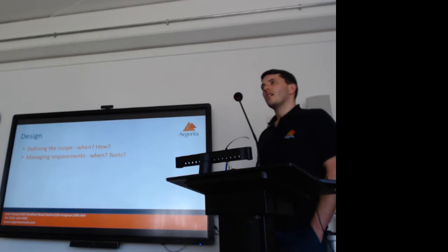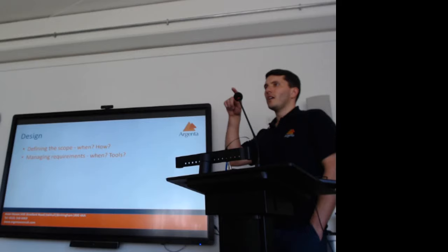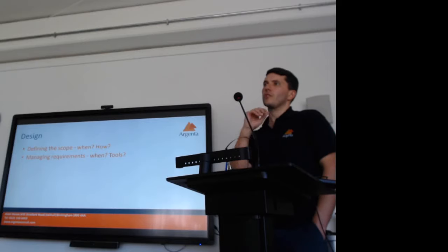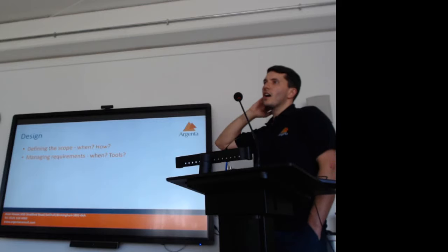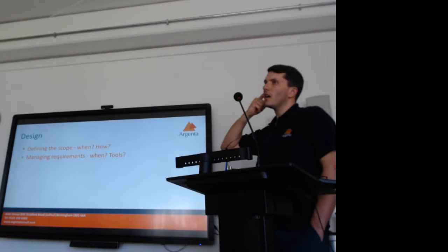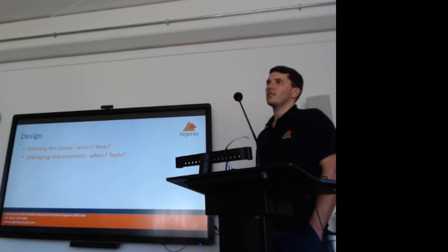I suppose in the past, can you just add this stuff? So if that question comes up, do you put that into your requirements document? If someone says to you, can you just add this in? Well, I just try and be direct and say, I could add that in. It might take me up to a week. That will mean I won't be able to do this. Is that a trade-off? So bring it back to the original deliverable, and then put some time scales around it.